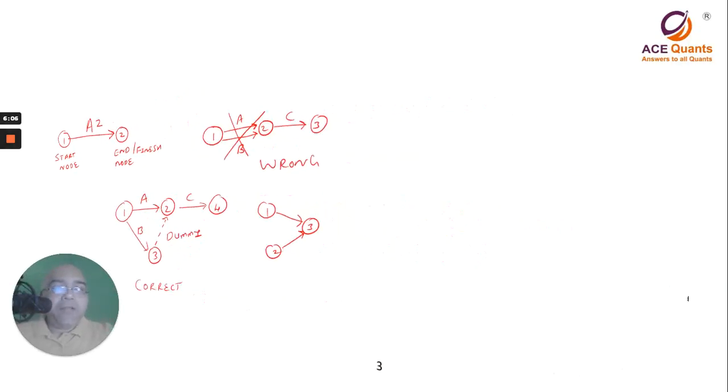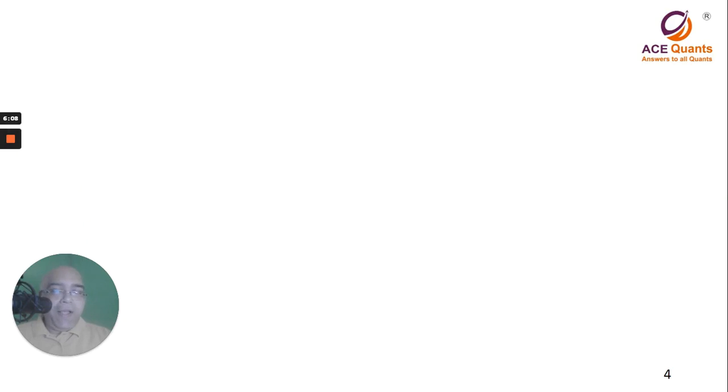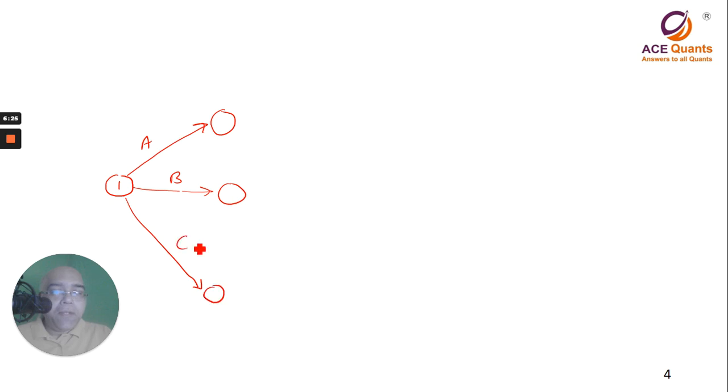So, we are going to start the network diagram, and as you know, activities A, B and C have got no predecessor, or in other words, we can start with activity A, we can start with activity B, and we can start with activity C. Now, I am not numbering the nodes. Why? Because once we have a final structure, then we can number the nodes.